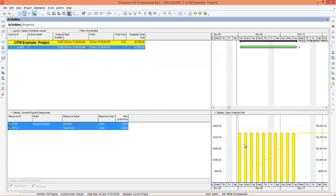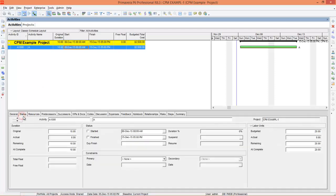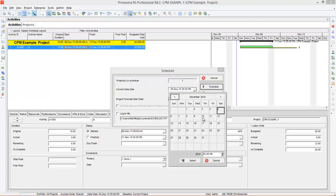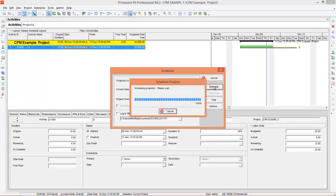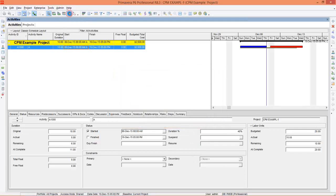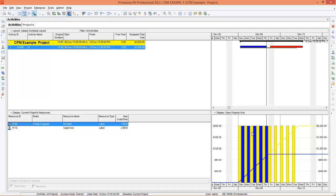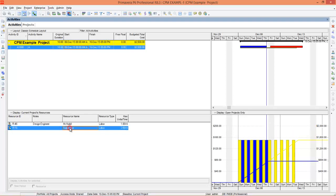You can see there are yellow bars that represent budgeted and a yellow line showing budgeted cumulative. Now let's update the project. To update the project you need to go to Status. Let's say this activity started on 6th December and you're updating it on 10th December, with six remaining days to complete. Reschedule it on the 10th. After that go to Resource Usage Profile — you can see there is now a blue bar representing the actual for Mr. Nabil, and this is Supervisor.